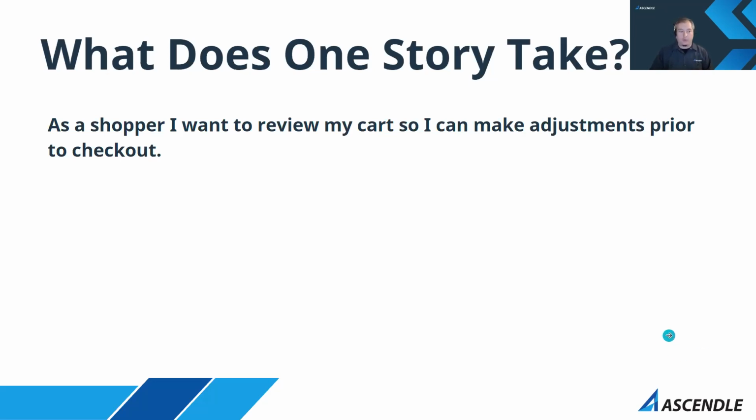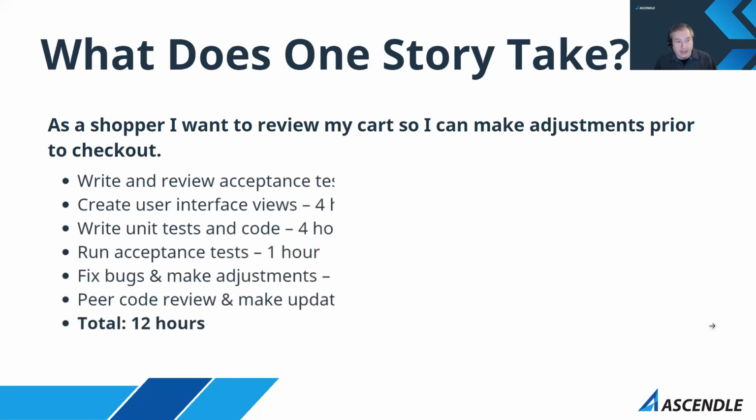Now, you remember we were looking previously at stories that were in that 8 to 40 range, and that may be large. So you want to take a story and probably split some of your stories down until they are something you could fully complete within the scope of a single sprint. And then write down literally every single task that would be involved in that story.